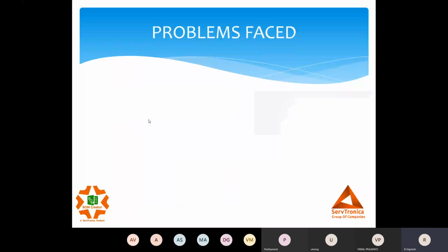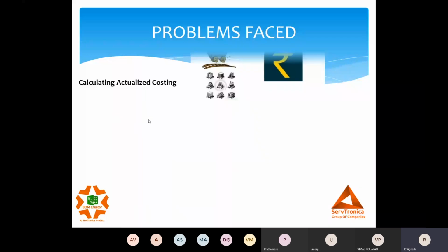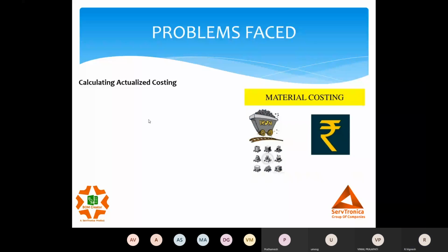Next is the project costing. When we talk about costing for a machine, right? Let's take an SPM industry or a packaging industry. What we understand is there are 5 major components of costing. One is material, second is the handling or labor cost, third is the engineering cost, fourth is the packing, and fifth is the transportation.